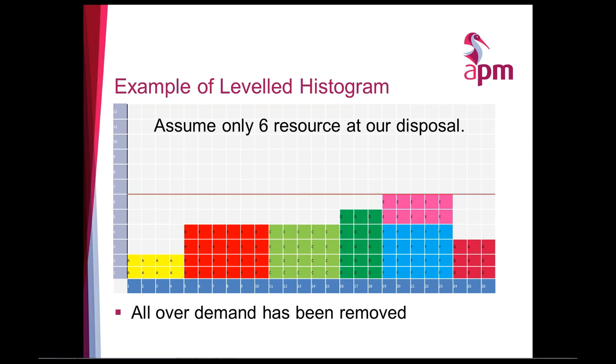You do things as part of your day job which we wouldn't schedule, like you have to fill your timesheet in at the end of the week. You might be expected to attend safety briefings and things like this. What we tend to do is build all those things into the estimate when we're trying to work out how much work is required to complete each of the activities. But yes, in reality, it does assume 100% efficiency on all your resources. In reality, we know that's not the case, but we have to deal with that by other means.